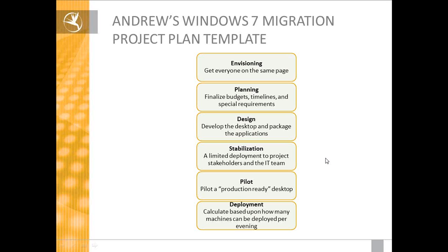So if it's a part-time effort for someone, maybe look to have that person do the simpler ones, and then maybe go to a third party for the more complex applications. But definitely an important part of it and something that drives the budget in the design phase.